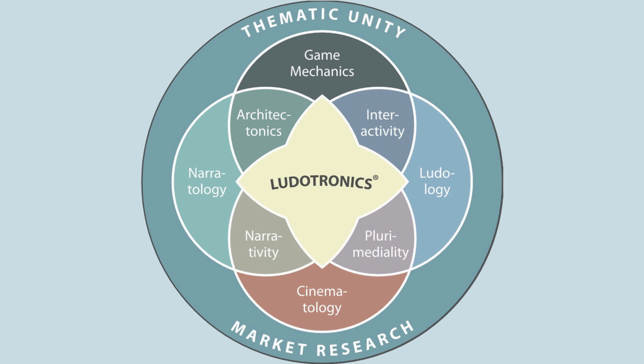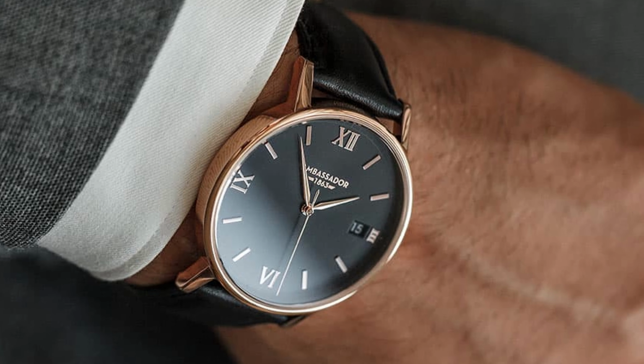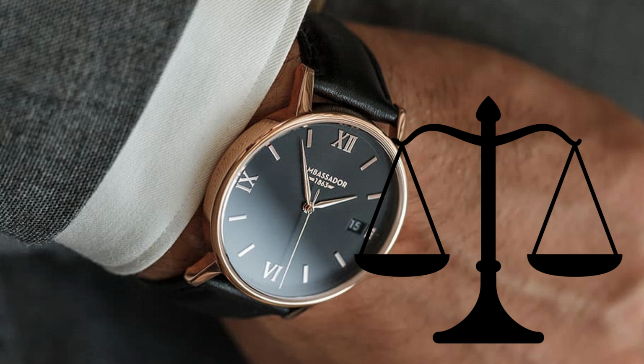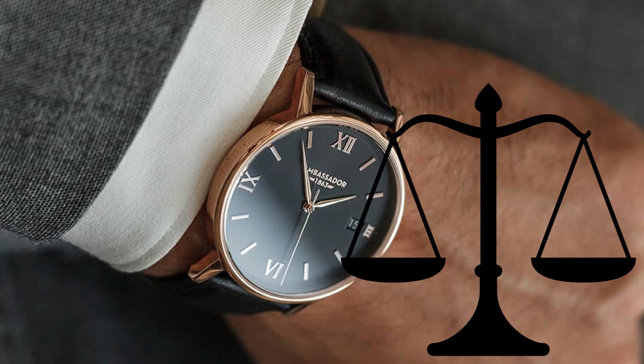The Peasant Uprise trailer took me over a month. All of this needs to be part of the overall project plan. But planning also needs to be timed. Don't spend 6 months planning a game that you might end up dropping anyway. So the challenge is finding that balance between in-depth planning and getting it done.